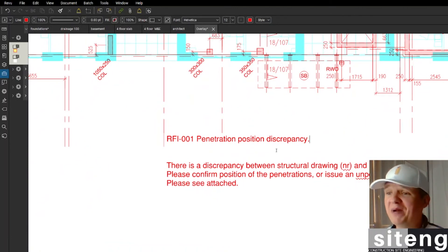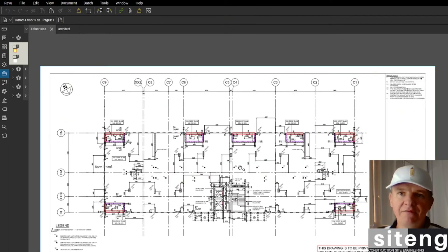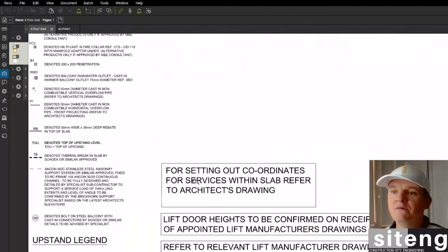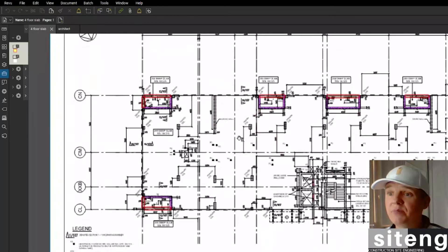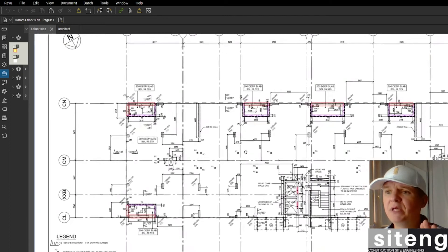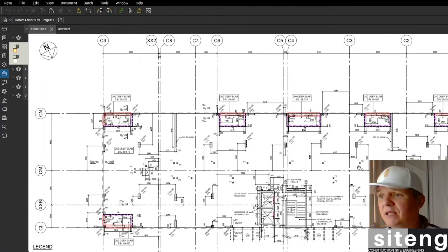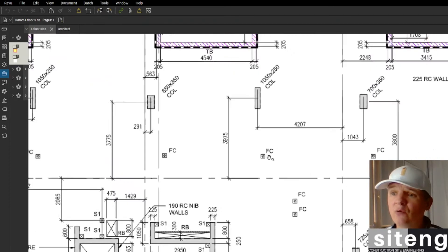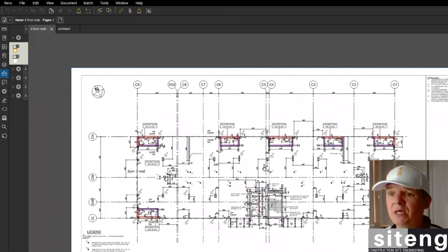That was the example of the RFI. Now I'll show you why reading the information on the drawing is so important — in real life we wouldn't even raise that RFI. There's a note on the drawing: 'For setting out the coordinates for services within slab, refer to architect's drawing.' This tells you these penetrations shouldn't be set out from this drawing, and there are no dimensions to them anyway.